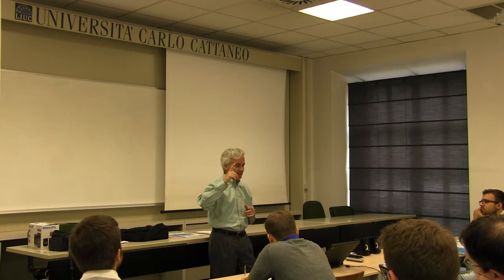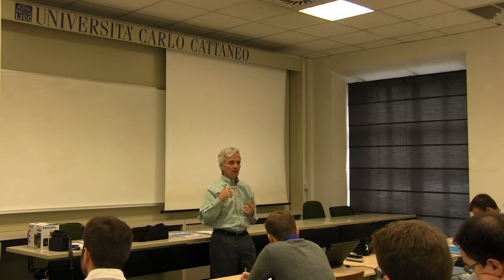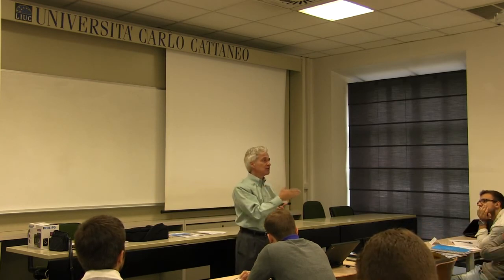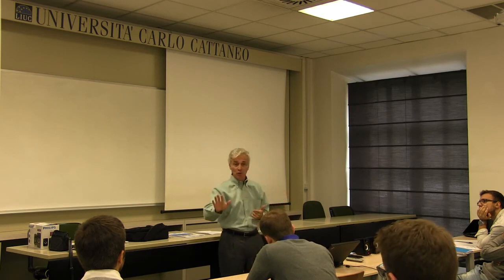So, last statement. Once completed and agreed to, we've created the schedule baseline and it is put under change control. Now you cannot change it without formally using the change management process, which we will discuss.